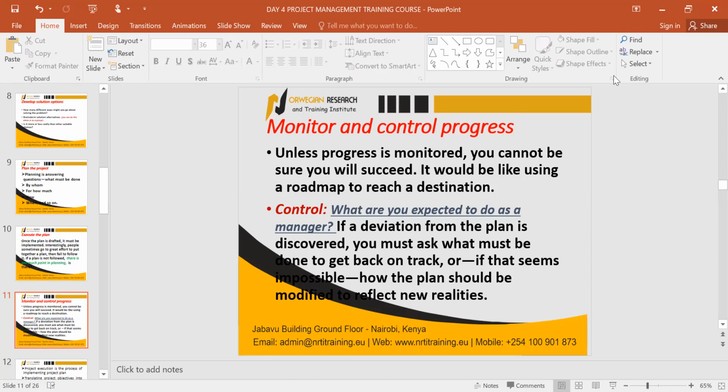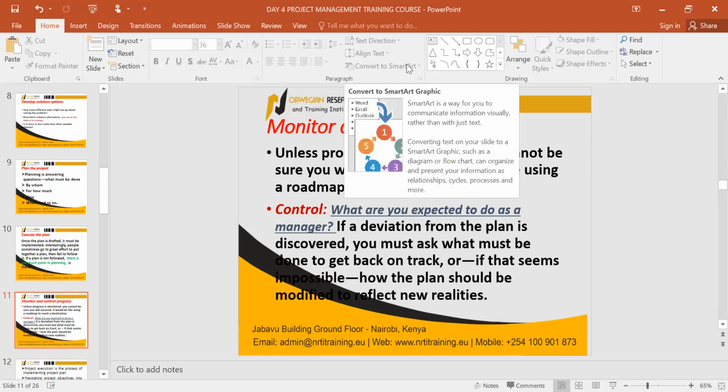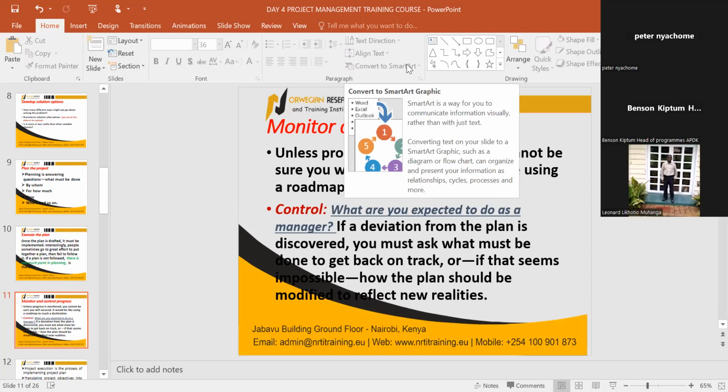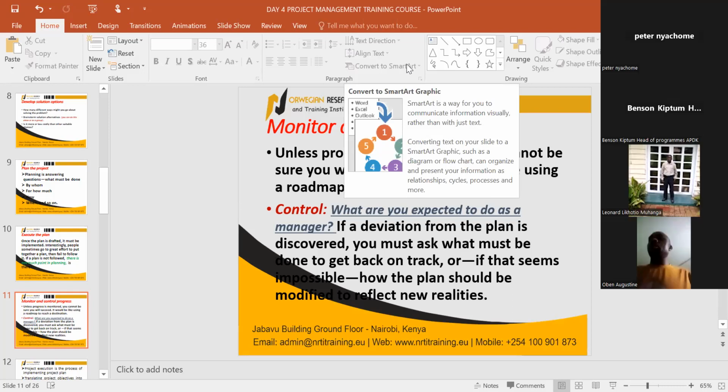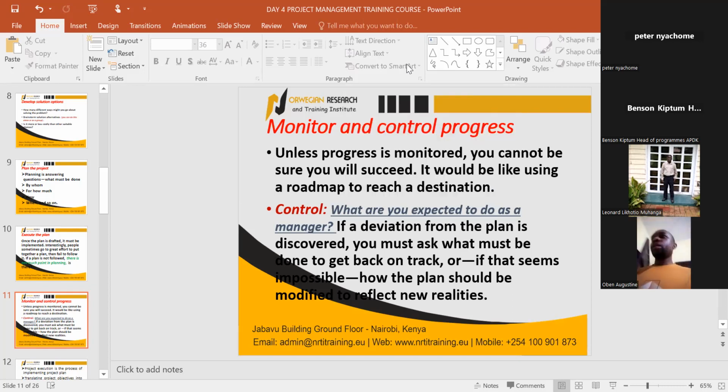I tell the engineer. So what will the engineer do? The engineer will go and create in the plan that section for the study room. And the engineer will tell me, okay, in order for this study room to be added, I will have to add some cost to meet it. I need $300 or $500 for this study room to be incorporated. It means the change that I've brought forth is going to be planned. And after being planned, I will have to add an extra amount of money to cater for this new additional change that was not in the initial plan. That's how we expect to behave.